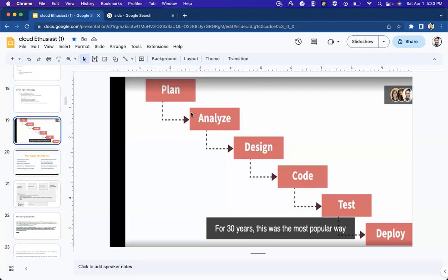But it's not compulsory. If you are working, it's not compulsory that you have it before. That's why I'm talking about the Agile processes, and change is allowed. There's something like, it's a must that we must have a stand-up every day. In that stand-up, you discuss what you're going to do, what you've done, and the challenges you are having. That's what you discuss in your Scrum.